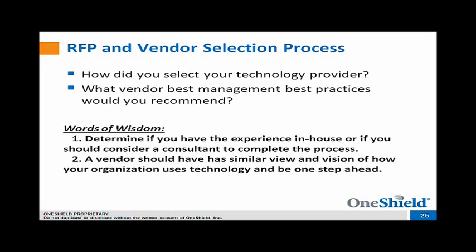I've been with Novarka for a little over 3 years, and I've done 14 vendor selection projects, and it's always very interesting, and clients have different priorities, but we bring to the table a proven process and an understanding of the solutions in the space that we can typically get through a full vendor selection anywhere from 12 weeks to 16 weeks. And it typically is composed of an RFI phase, a demo phase, and a reference phase. But we do bring certain assets and knowledge to the table that we can accelerate the overall time frame and help ensure a solid selection at the end.